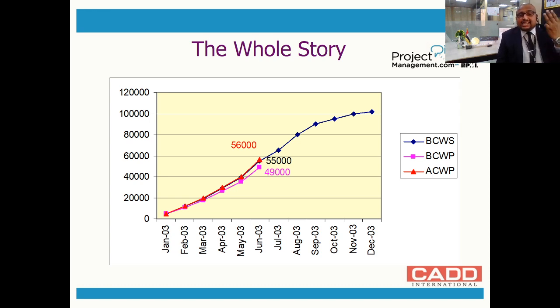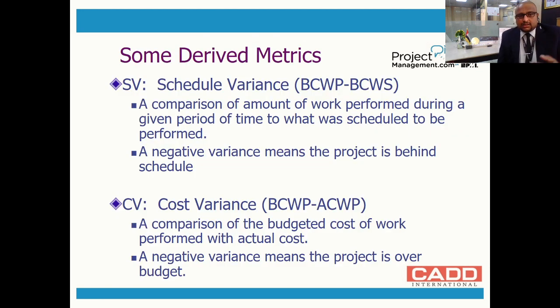So irrespective of the whole story and all the units used, you are just getting these three variables. You are consolidating the entire report into just three variables: actual value, planned value, and the earned value. The benefit is that when you put up the report, the schedule variances and the cost variances can be easily derived.